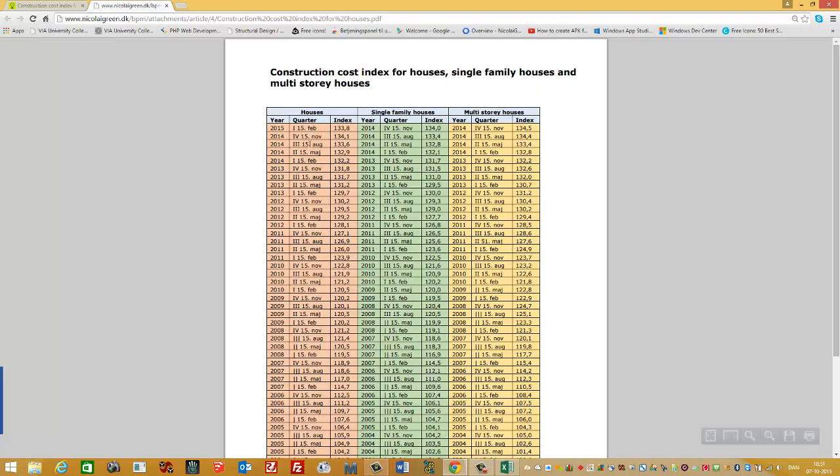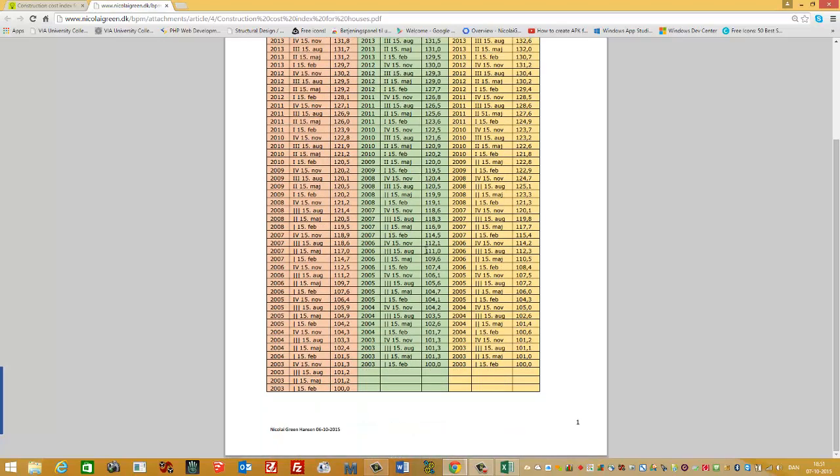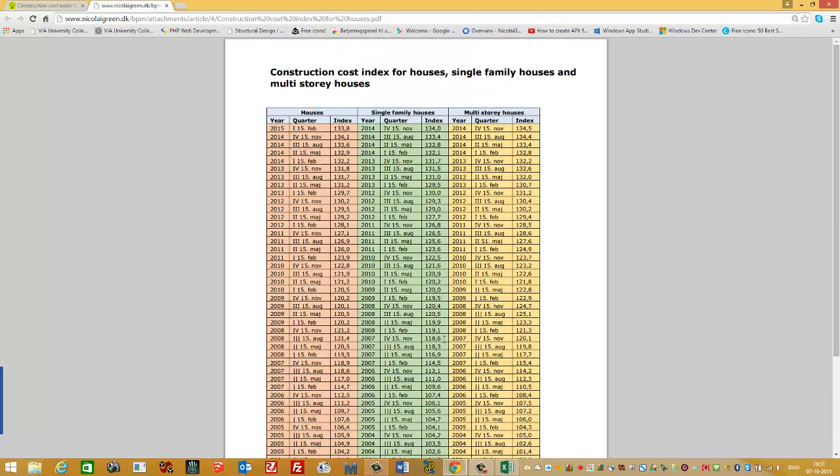The first three columns are for general houses. The next three columns, the green colorized columns, are for single family houses. Index 100 is from 2003, and the latest index is from 2014 in quarter four. So that's the latest one we have, and there you see the index is 134.